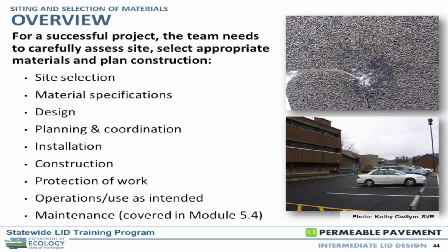In my experience working with permeable pavement, the most difficult issue that I've faced is maintaining site access and actually being able to construct the project without compromising the permeable pavement areas. That's been the single biggest challenge. However, in locations where we've been able to be creative and address that by construction sequencing or certain remedy procedures or protection procedures, it can be quite seamless.